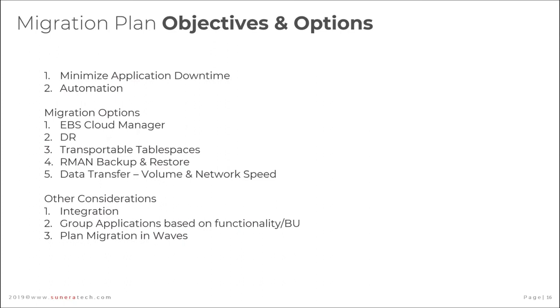And typically what we see is all the infrastructure services, DNS, identity, all of those get moved first. So you have the plumbing essentially available in cloud, and then you start migrating your enterprise and non-enterprise workloads as well. So you pause again here.